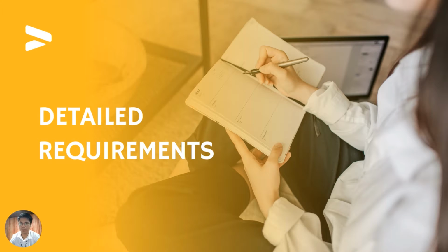This translation process is reflected in the WBS box structure, and embedded in the box definitions is both a requirement and a corresponding work relationship. A related value of this approach is that it serves as a good communication tool between the user's plain language requirement statement and the technical work required to produce those requirements.